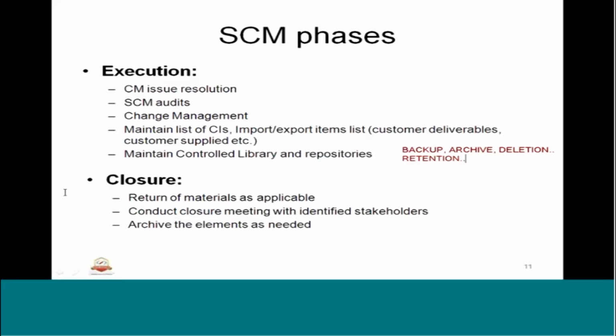Lastly, what we are going to do in the SCM phase is the closure. Once all the project activities are done, we are going to have the SCM closure. So return of materials as applicable, we are going to return either to the customer or to the vendor. If we have rented out any power supplies sort of material, we are going to return them, and conduct a closure meeting with identified stakeholders.